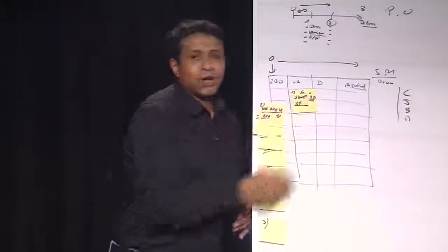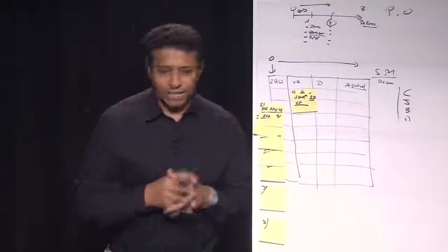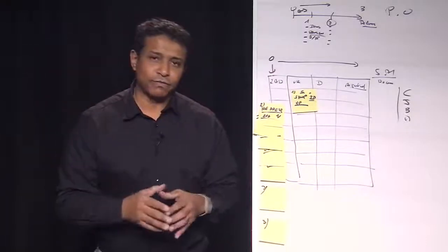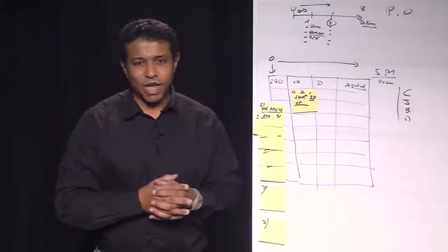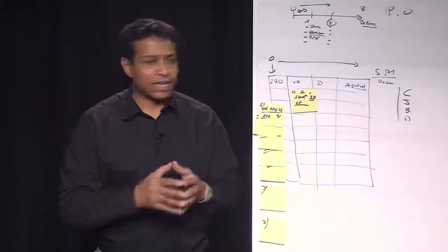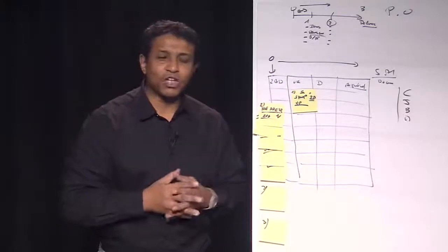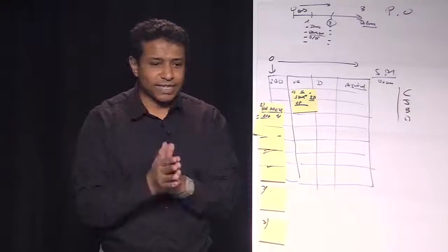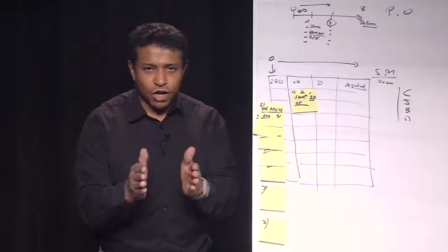So to make this realistic, in your own company, what happens? It happens that developers are not enough to do this project and other projects. So what has to be known is whether it is possible for Charles to lock 2 days in his planning only for car stores.